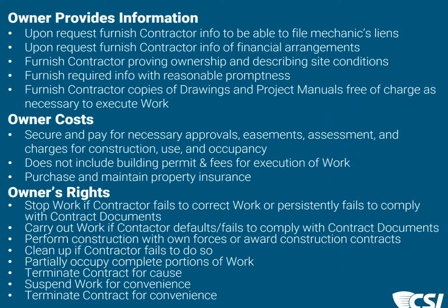The owner has the right to partially occupy a portion of the work if that suits their needs and allows their existing operations or newly started operations to occur in a time frame that they need. Typically, these things are discussed prior to construction. Projects may be phased.